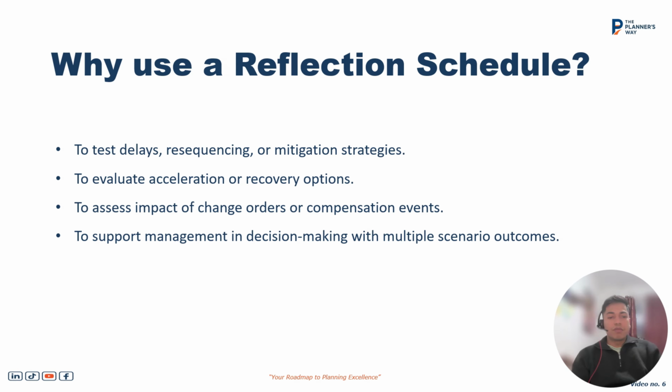I have highlighted a couple of key points where a reflection schedule is used to test delays, resequencing, or any mitigation strategies. Secondly, to evaluate any acceleration or recovery options. To assess the impact of any change order or compensation event prior to the change order being approved.